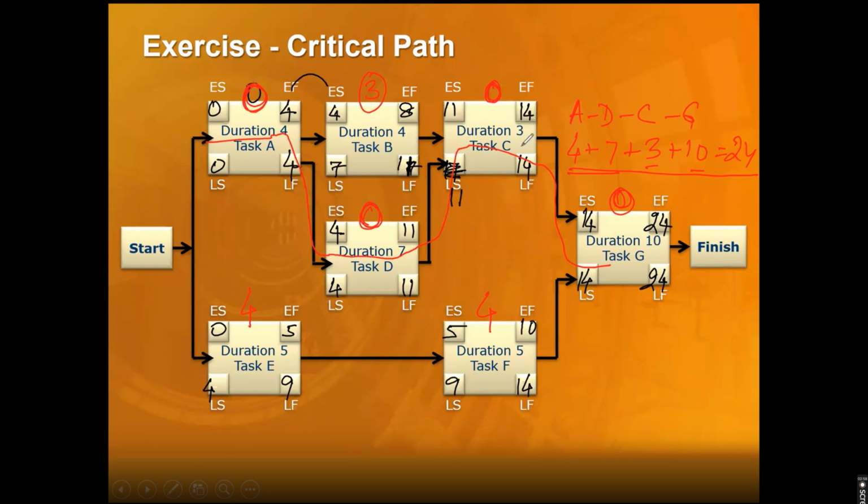So I have got critical activities known, critical path known. I know which activities have buffer. Let's look at the buffer and see whether there is a free float or not. Is there a free float here? If it is, then how much? 3 days? Perfect, yes. So there's a free float of 3 days. I can delay this activity for 3 days, and if it gets delayed, this start will not change.